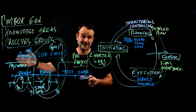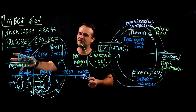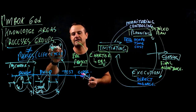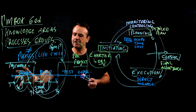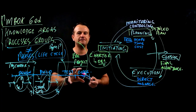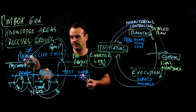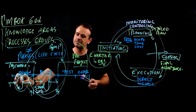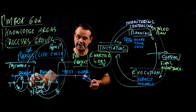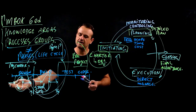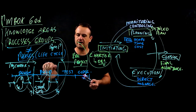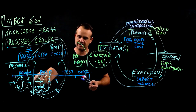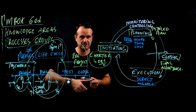We initiate the project with a project charter, do a macro project management plan, then execute. For each and every phase you do the same: initiate the phase, plan the phase in detail, execute, close the phase, stage gate, approve the next phase, then initiate the next phase, plan, and execute. Many people believe they have to complete all the initiating and all the planning before they execute anything — but you can use rolling wave planning, planning in waves.